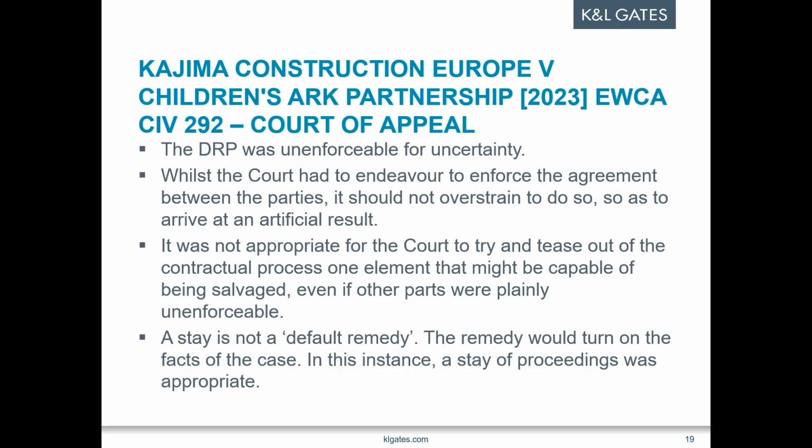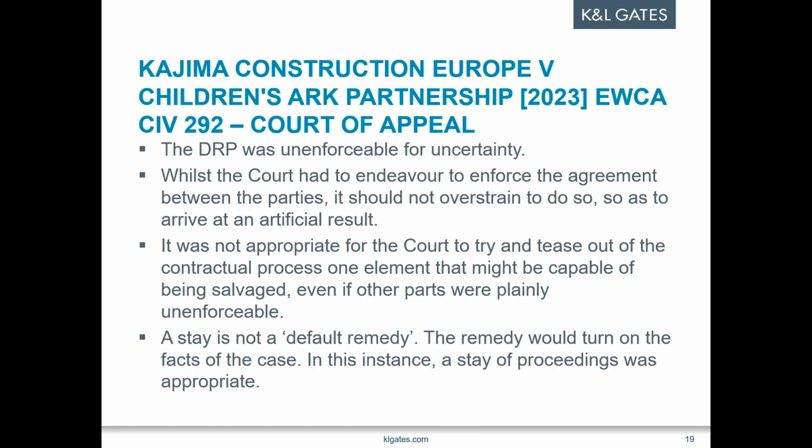So this really is quite a reminder, because that's quite an interesting point there, of the need for clarity, firstly, in dispute resolution procedures. In the context of NEC, parties should obviously be very careful if ever amending the W clauses or supplementing them with some sort of referral to senior representatives that is different to the ones that are included in NEC4. Particularly if we're looking at multi-tiered contracts and we're looking at dropping down some provisions or cross-referring, always make sure it works and is sufficiently clear, and the provisions aren't just entirely repeated without thinking about how they might need to be changed.